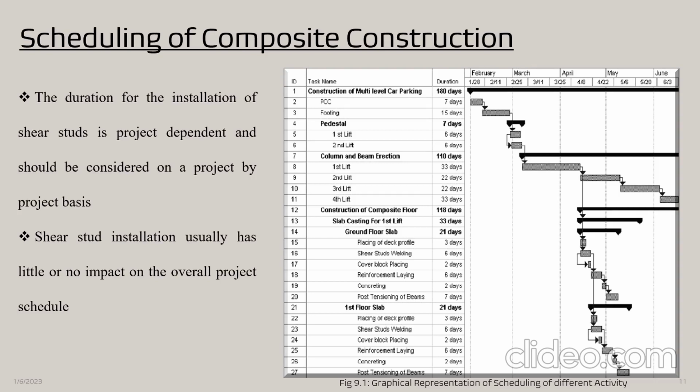The duration of the installation of shear studs is project dependent and should be considered on a project by project basis, but shear stud installation usually has no impact on the overall project schedule. Here is the graphical representation of the scheduling of composite construction as follows.